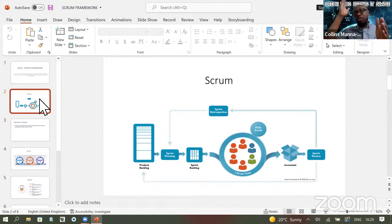He is the bridge between the product owner, the managers, and would say, Mr. Ash Mufara is there. Okay, Mr. Mufara is saying, put that. That Scrum Master is the gap because he needs to keep the team, because the team is the developers, the testers, everything combined, security guys. He or she is the one who sits there and makes sure those teams concentrate on the task at hand. No interference, nothing. Mr. Ash can say this. No, we said no, we have committed, because that is 2 weeks you have to deliver. Because if Mr. Ash came and made a change and it's really vital, they will really want to change it, they will call it scope change.